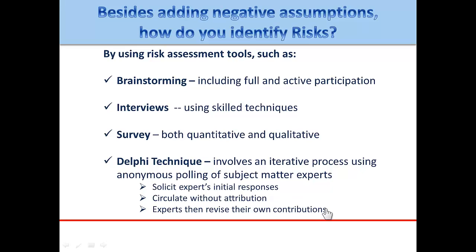Each expert is then asked to review all of the contributions, read what they've gotten from the other experts, and then, based upon what they've written and what they've read from others, revise their own contribution. A consensus is likely to be formed, according to those who've experienced this Delphi process, by the end of it.